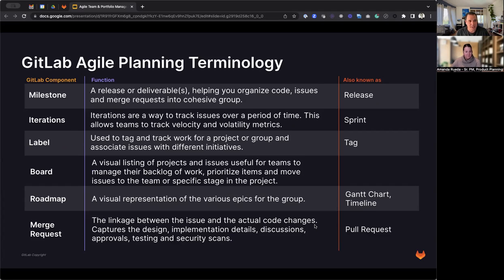Milestones play a central role in the planning process, serving as time boxes for larger capabilities over extended planning horizons, such as program increment or release planning. They go beyond being simple containers for work and are designed to represent specific and strategic time-based goals. When assigning your issues to milestones, epics inherit the milestone start and end dates from the delivery workstream. This integration empowers a dynamic roadmap view, aligning your plan with your team's capabilities.